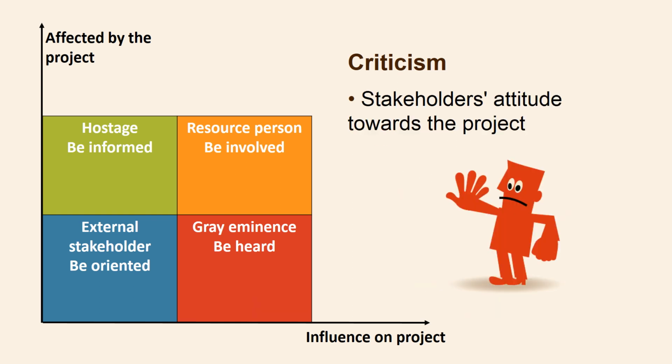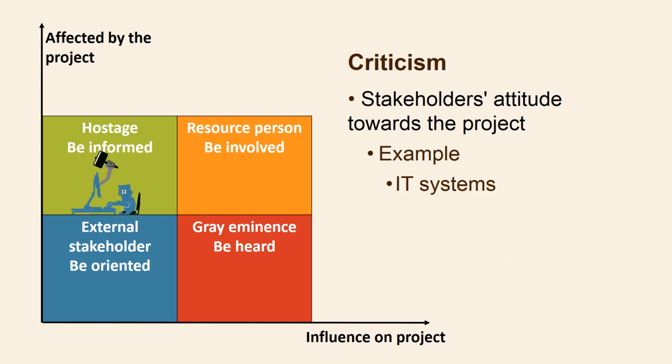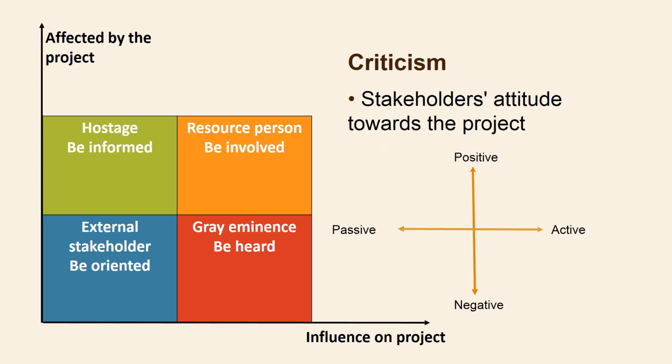The model does not consider the stakeholders' attitude towards the project. A classic example is the users of IT systems when the system is forced on the users without warning. That is why hostages must be informed. Therefore, you may want to classify the stakeholders in this figure, so you can better target your communications with the stakeholders.